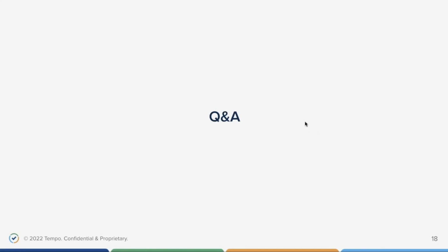Yes, I believe I have answered that question because there are multiple questions coming up after that was already answered on typing. But just to clarify, when you plan the resource, we have generic resource that you can plan on, let's say, a person that you intend to hire in the future, but you just want to plan ahead of time, then you use generic resource. If you want to plan against a specific skill, we have the skill sets that you can assign to the resource. And then after you got that person hired, you can transfer all that plan that you have for that generic resource onto the new employee, so that you can really plan ahead without worry that you don't have a placeholder for it. I hope that answered your question.